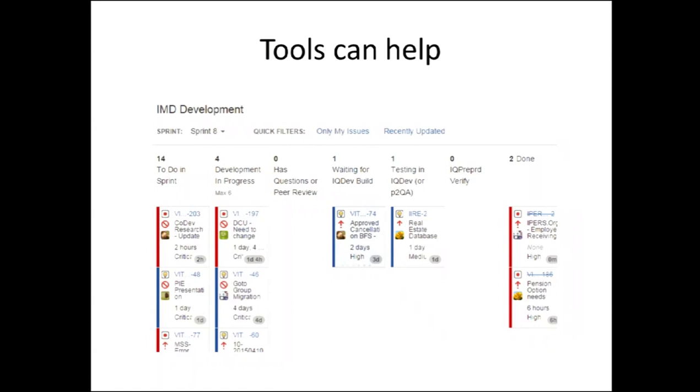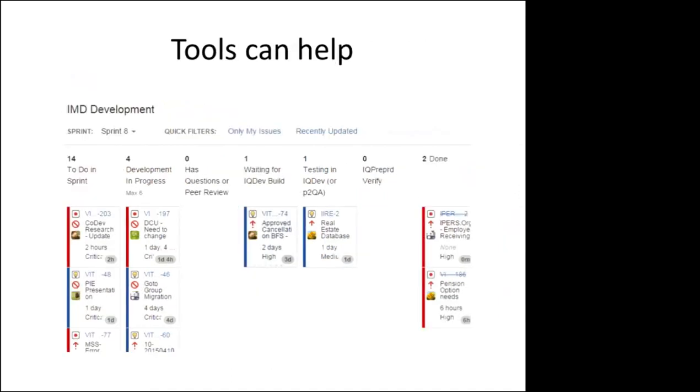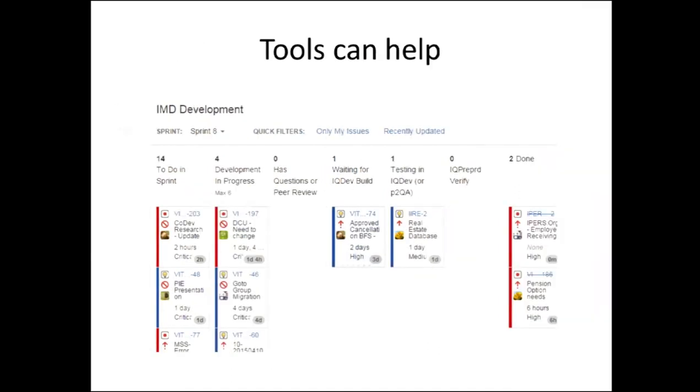You don't have to do Scrum, you can do Kanban. If you do just Kanban, you're no longer time-boxed, but you are still watching your iteration and workflow, and you can start with that, because then you can show people what the visualization does.